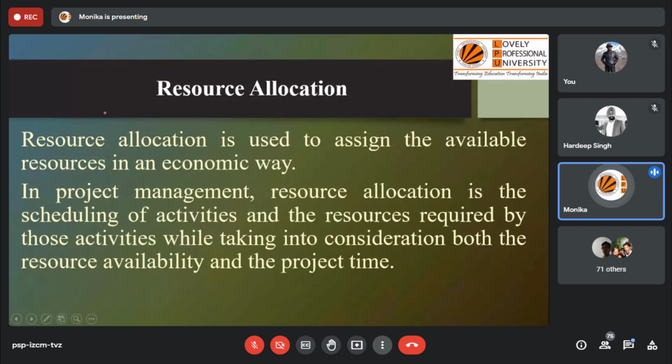In the planning stage, you will prepare a list of all the resources you have in your company or organization. After that, while you plan the activities, as per the need of each activity, you will allocate from that sheet to a particular activity.